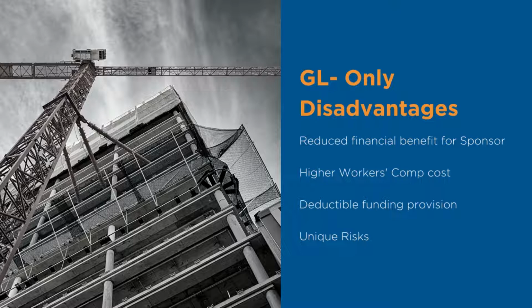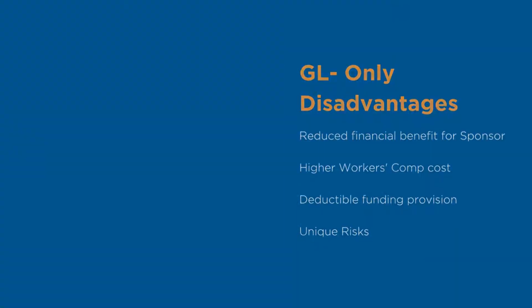GL-only CIPs are most common for projects that have very unique risks or with sponsors not interested in the financial risk-reward outcome seen in a loss-sensitive program.